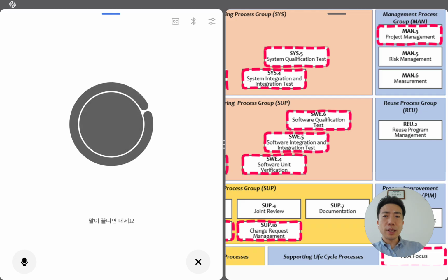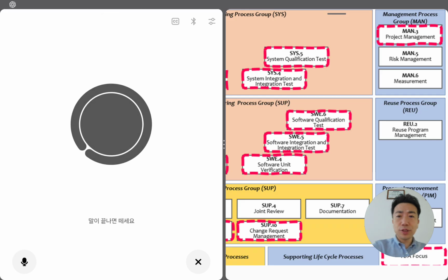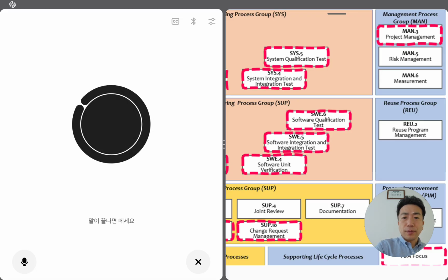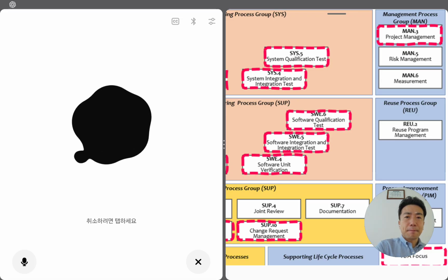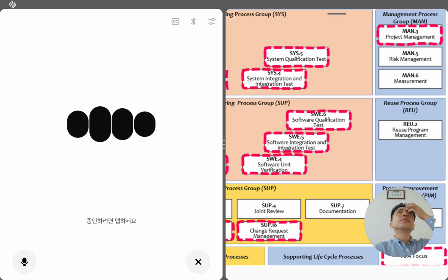So baseline means simply a frozen version or snapshot version. Frozen version or snapshot version. Am I right? Yes, that's right. A baseline is like a frozen or snapshot version, a fixed point in time that the team agrees to treat as the official version. After that, if someone wants to change anything, they don't just overwrite it. They create a new version through the change control process. So, in short, baseline equals an approved snapshot of your document or design that everything else compares against.